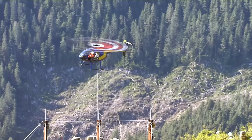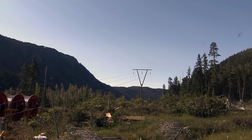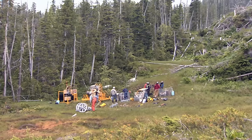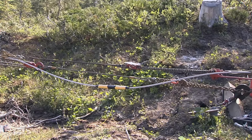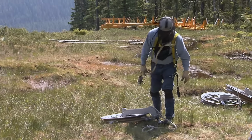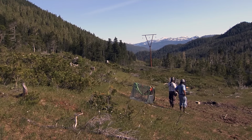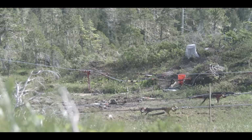Since a single spool or reel can't hold enough conductor to reach the entire pull's length, it's time to see how they're spliced together using a nifty and efficient little device called an implosive sleeve. The implosive sleeve allows both the splice and the wire to be pulled through the travelers, whereas a conventional sleeve or splice cannot. In this case, we're at pole structure 137, and 2 lengths of wire are going to be joined to make the 16,000-foot pull.